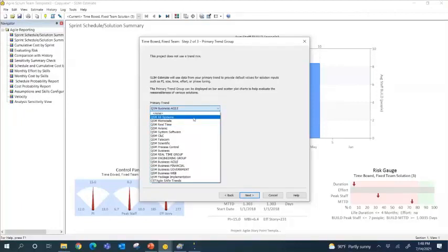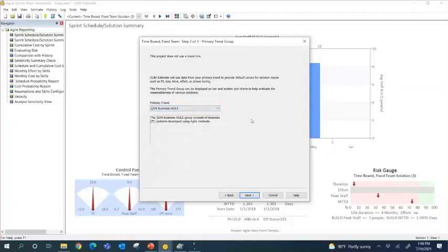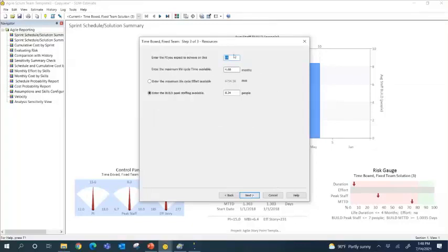When I click on one of these, what happens is it brings in the typical cost and schedule and effort numbers for this type of project. Not only this type of project, but the most recent projects, most recent deliveries, most recent releases of cost, schedule, and effort. So when I click on that, it brings all that in. And then when I hit next, the PI is going to populate based on my historical data.